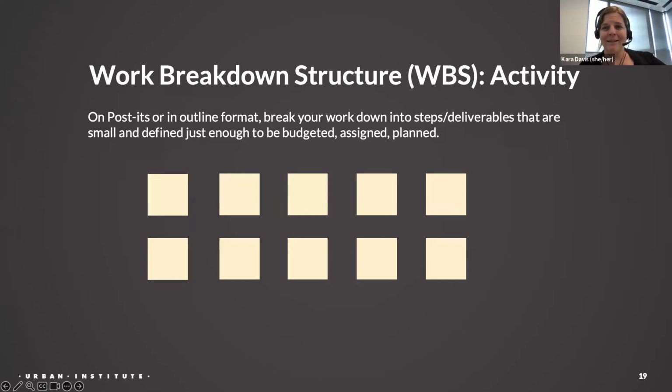Testing, steps like that often get missed in a project plan. And then you realize you haven't budgeted time for them. So try and write down everything you can think of. I'll give you about 3 minutes here.